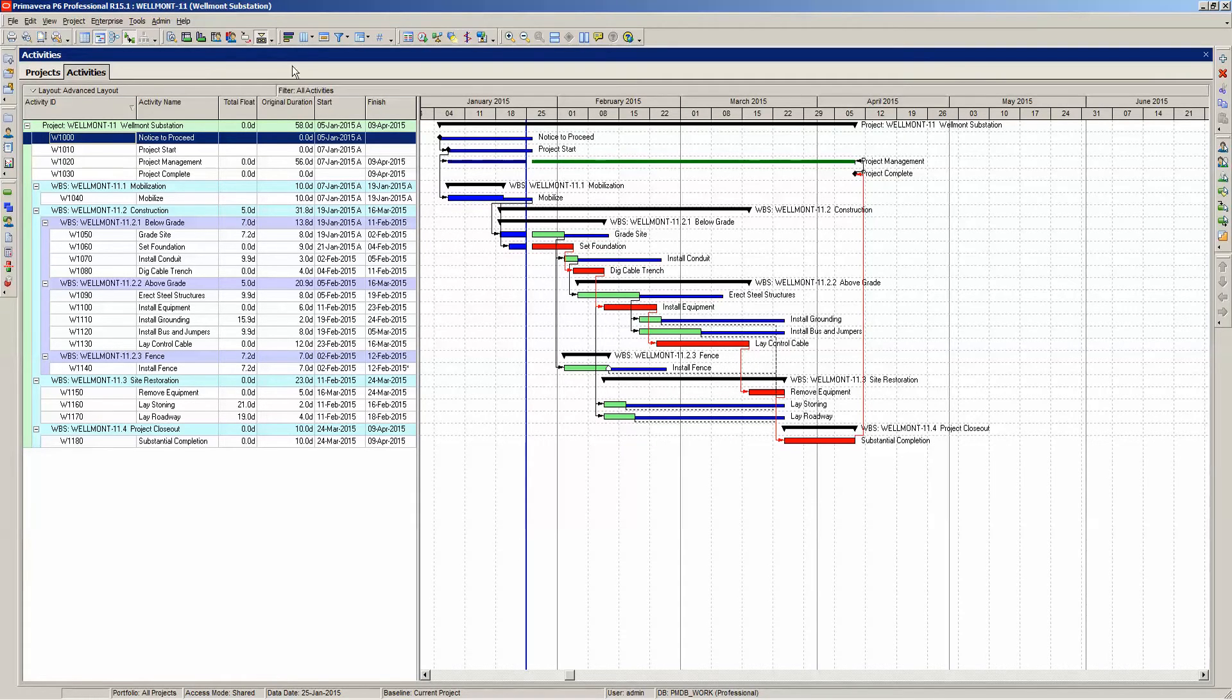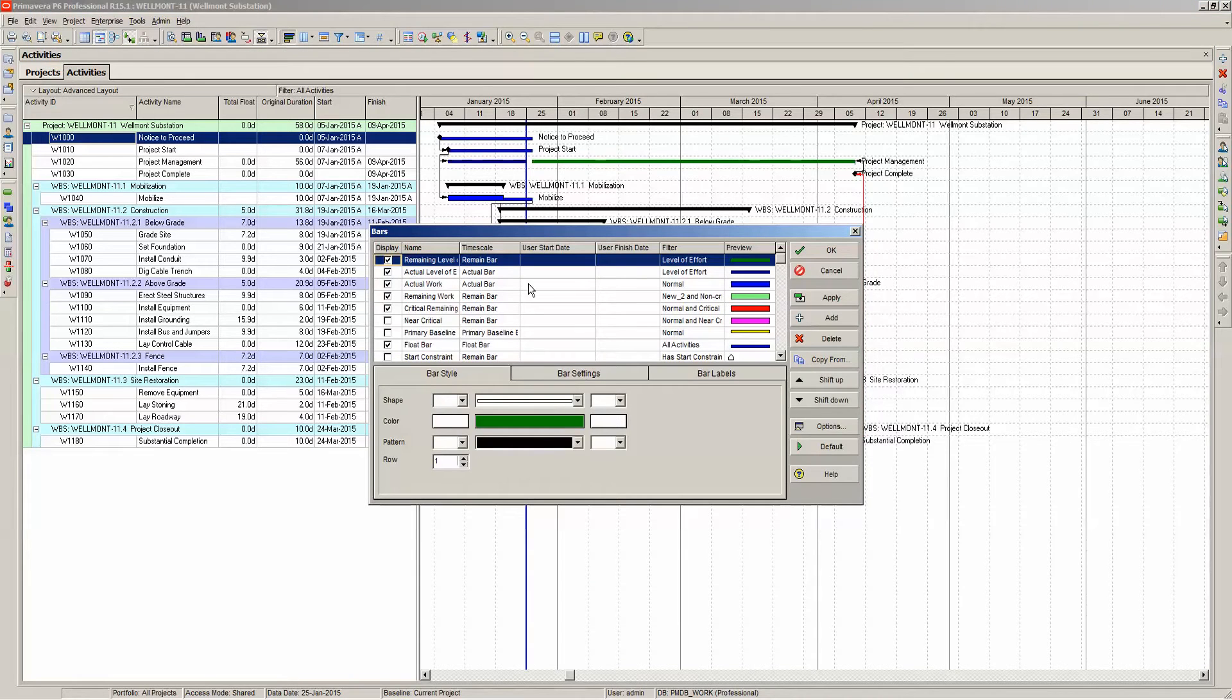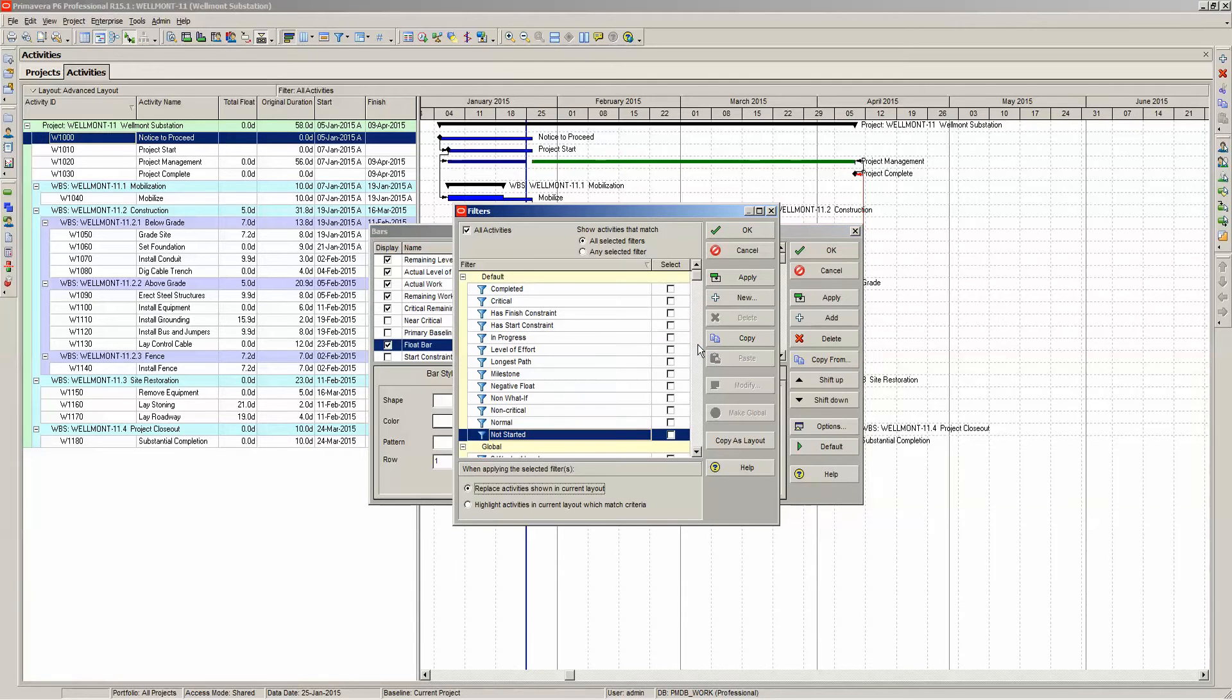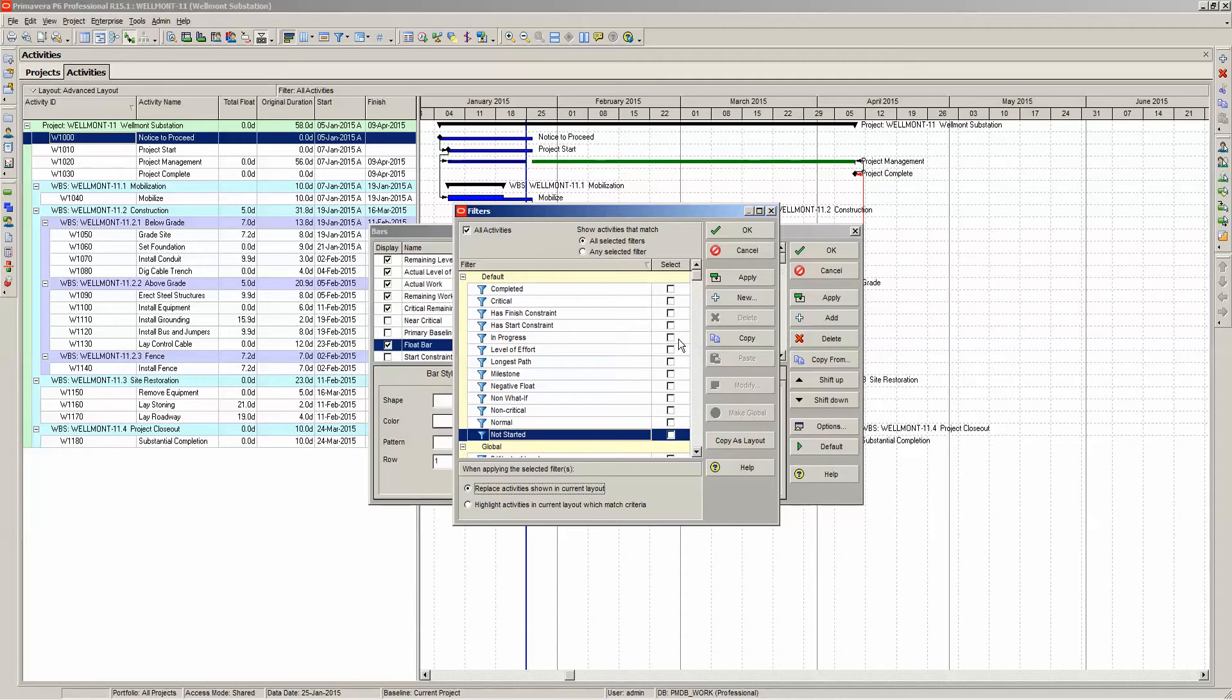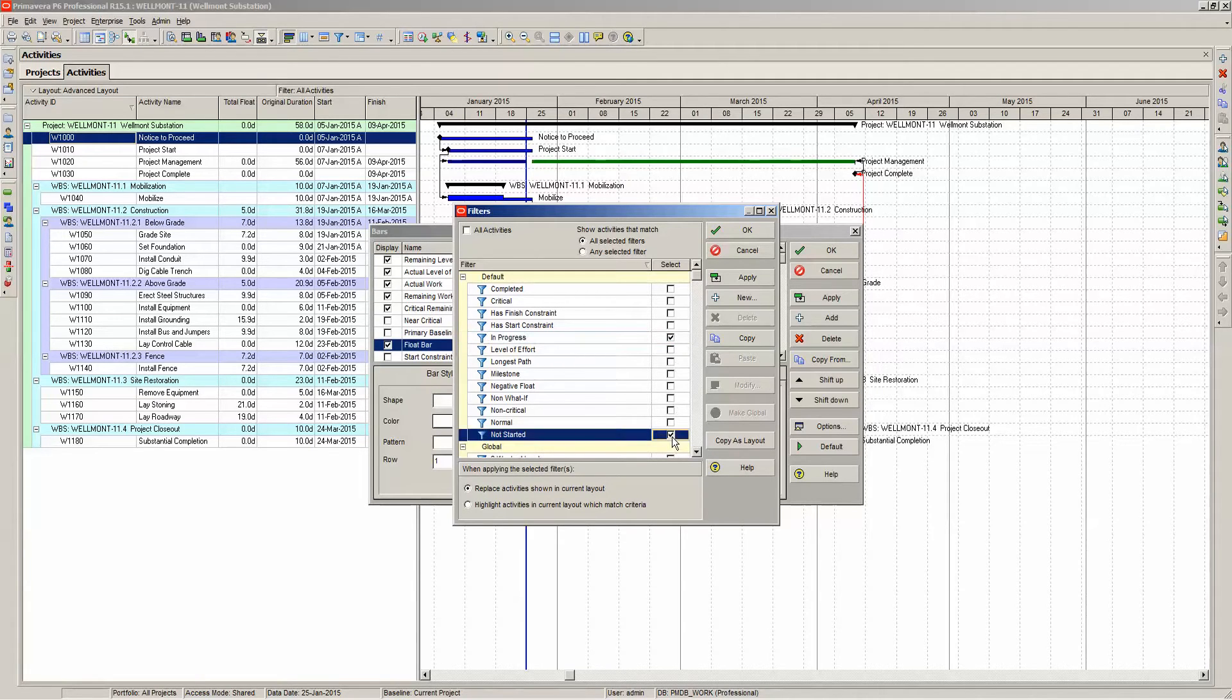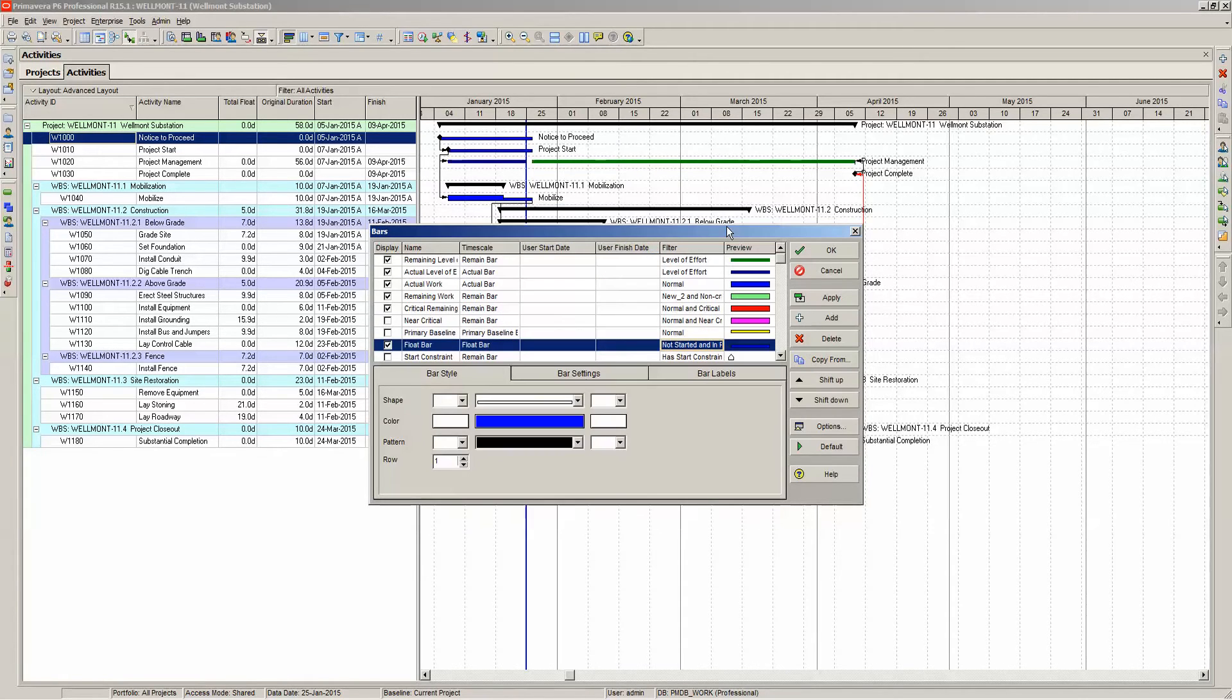Let's go back to the Bars dialog and let's go to the filter column. Where it says all activities, double click on that. We want to select this so that the total float displays when the filter says the activities are in progress or not started. So check off in progress and not started. Let's apply that and then hit OK.